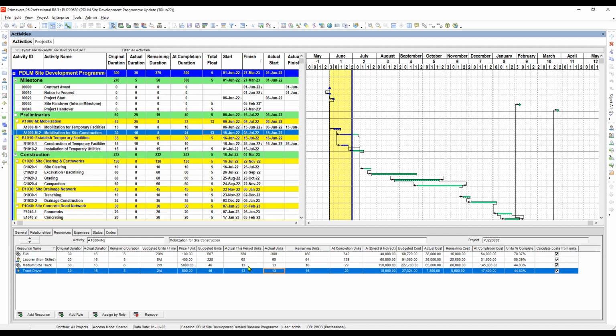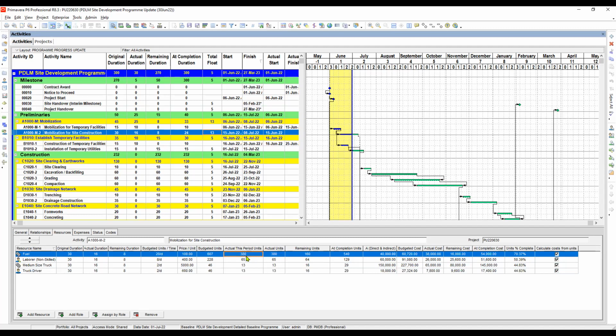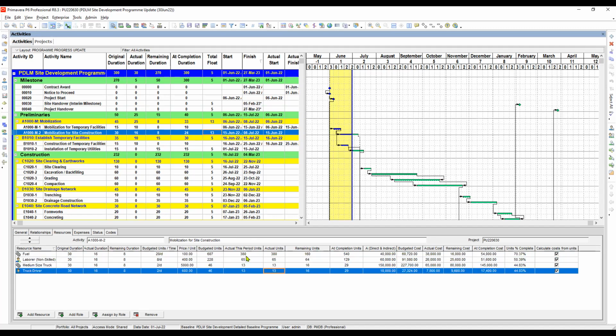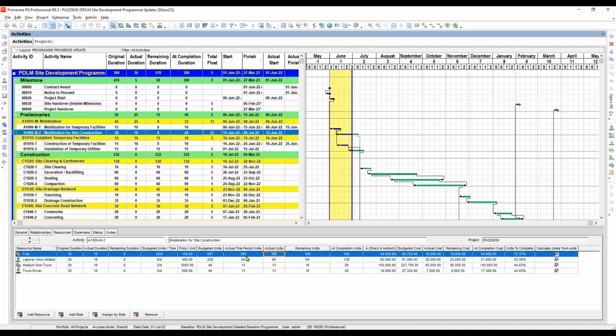Once we run the store period performance, these period values will be removed, which means that in the next update, we can input the actuals again, and the current actual here will become the previous cumulative units. So that means in the next period, once we input again here, this one will be blank again. So sorry. Okay, let's try it.